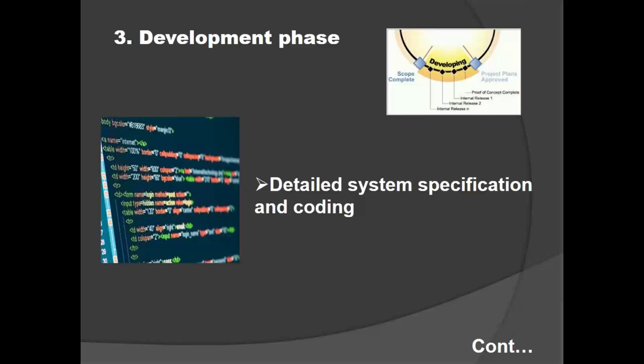Okay, like what is that requirement, requirement ID, requirement description, and in which module it is going to come, what are the technical properties, what are the functional properties, who is the developer who is developing, how much work has been completed, and who is the tester who is testing, whether test cases are prepared or not, did we make any changes to this requirement, if so, when we did it, on which date, and why we made the changes.